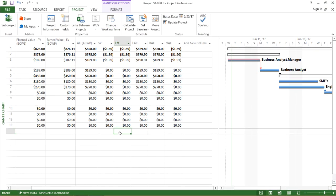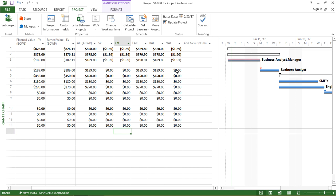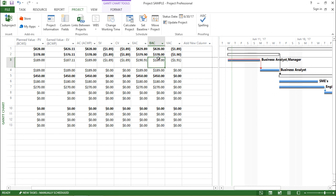In this video I will be specifically talking about EAC, BAC, and VAC. I have already explained PV, Earned Value, Actual Cost, Schedule Variance, and Cost Variance. Let me start with the BAC column — that is Baseline Cost. In simple words, it is the baseline cost of the project defined by the cost involved including resources, materials, and other items used in the project. This involves the cost of all the resources used in this particular project.